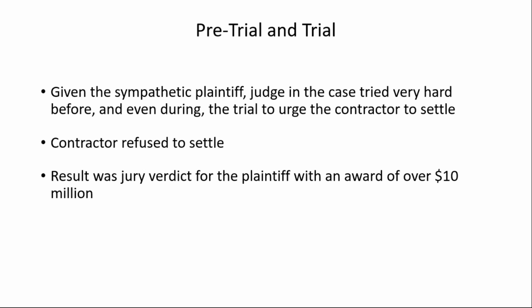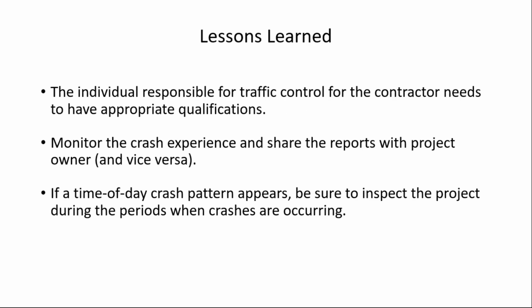But clearly, I think you can see there were some violations of the contract. And so what we can learn from that is obviously you need to comply with the contract. Here again, we get into the need for training, work zone training, and probably the need for communication between the contractor and the road agency in terms of sharing crash experience. The road agency had the crash data and they had the complaints from the restaurant manager, but they never shared that with the construction company.